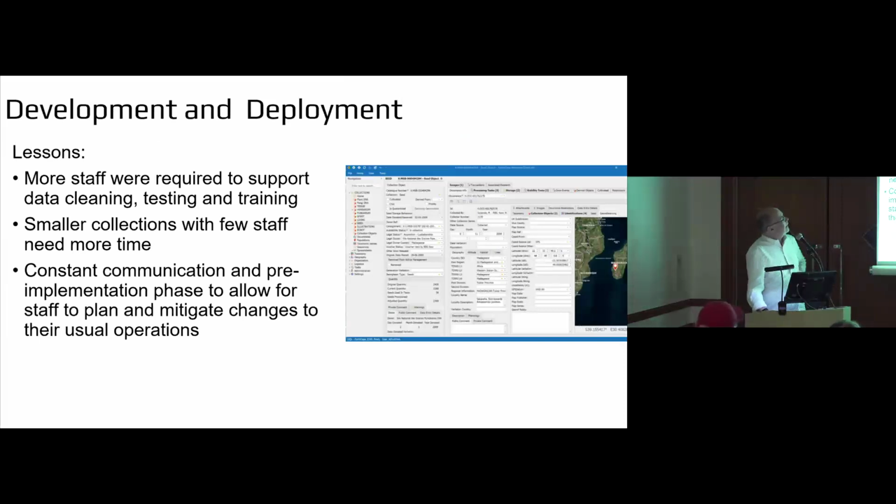So, beginning of lessons. I think we probably initially underestimated the amount of data cleaning that had to be done, and the testing and the training. And bear in mind, for a lot of people it's the first time they've ever tested, and that's a complete change for them. It takes time. It's more impactful in smaller collections, because if you've got a big team, you can spread the share about. If you've only got 3 curators in a particular collection, that's quite heavy on them. So that takes longer than you think it's going to take in the smaller collections.